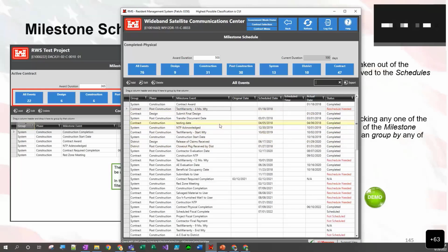The main gotcha with this particular area is sometimes you're able to get into a circle, essentially one milestone linked to another. But we do have a check in there now, which actually tries to prevent that. So you should not be able to do a circular link that links one milestone and comes back. So you shouldn't be able to do that now, but that was an issue in the past.